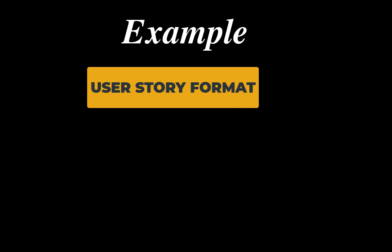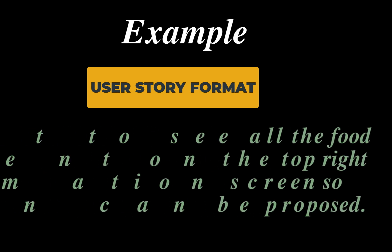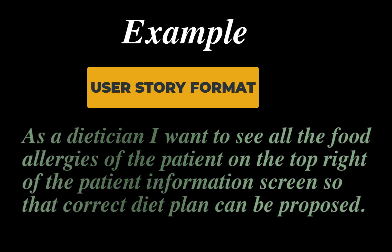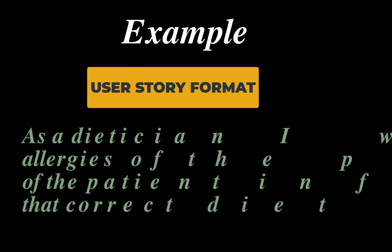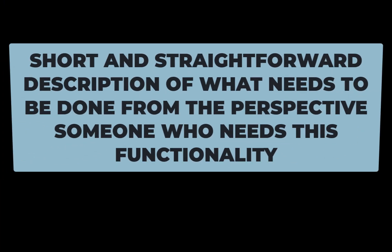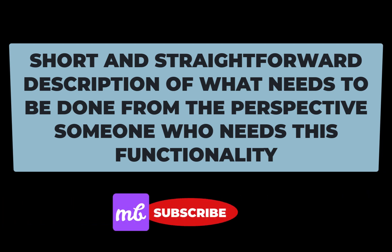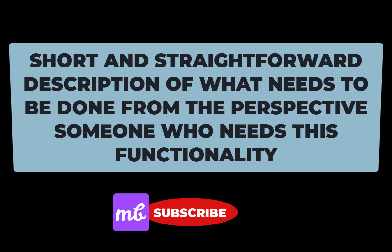Let's have a look at the user story format first. Taking this same example, a user story could be written as: as a dietitian, I want to see all the food allergies of a patient on the top right of the patient information screen, so that the right diet plan can be proposed. Hence, a user story is a short and straightforward description of what needs to be done from the perspective of someone who needs this functionality.